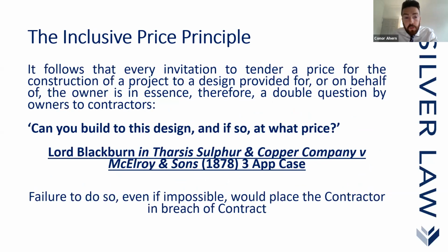This goes back to the case of Tharsis Sulphur versus Copper and Copper versus McElroy, which is 140 years ago now, but it's still good law, and it still asks the right question. Failure to do so by the contractor, even if impossible, can place the contractor in breach of contract. So, I'll leave contractors with that cheery note. Basically, you've got to make your position clear, understand what's in your contract, know what you're signing up to, and manage the risk accordingly.